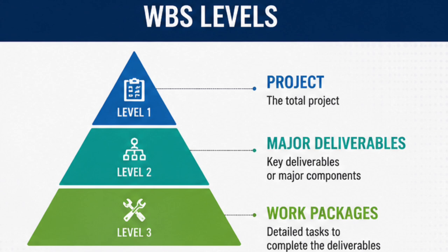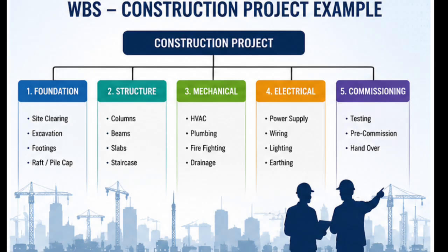Then your next WBS could be manufacturing or fabrication. For fabrication, you can further divide it into steel structure fabrication, vessel or reactor fabrication, or exchanger fabrication. That could also come under manufacturing.